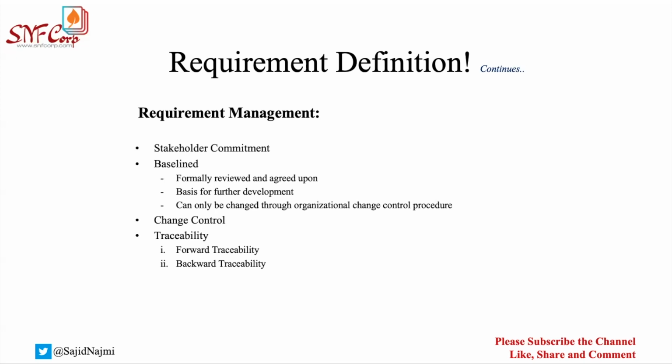In the Excel, you will write the requirement number and a little bit of description of the requirement. Maybe you can also have some IDs of the requirement. You will also document the reason and the source of this requirement, and what section of the software requirement documentation contains the details about this requirement. So that in future, if any of your colleagues, peers or management come to you and ask about any specific requirement, you should be able to go and find the details of the requirement.